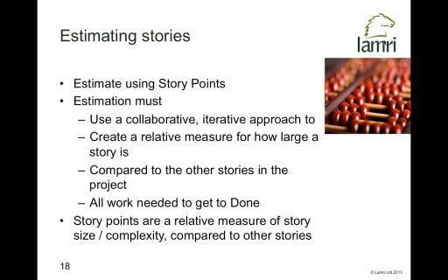Is it double the size? Is it half the size? Is it 3 times the size? And incorporated into that estimate is all the stuff I need to get to done, and we've already previously defined what done means on our project. There are ways of doing this out there. One approach I really like is planning poker. Just go out and Google it if you want to.